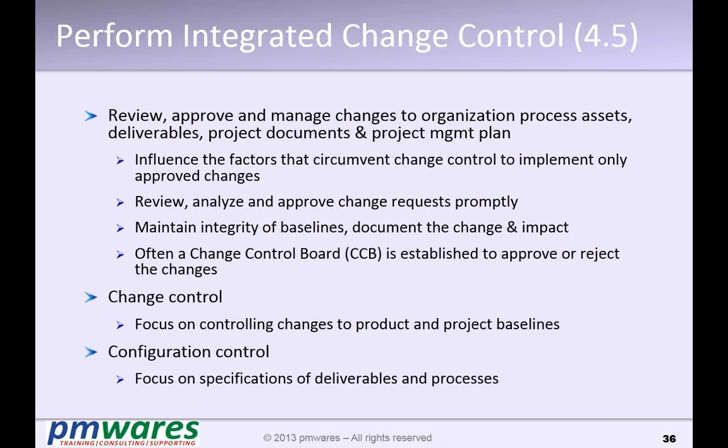So the change control process helps us to maintain the integrity of the baseline. The baseline is what we initially agreed upon with the customer on the timeline, on the scope, on the cost. So any changes coming up should be formally introduced, and the baseline should be updated. We should not do anything which violates the baseline. So first update the baseline and then execute it.